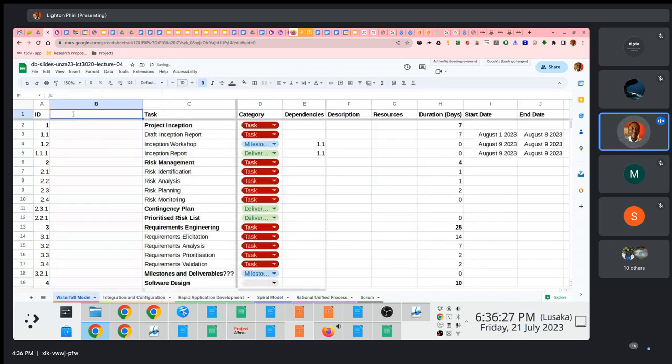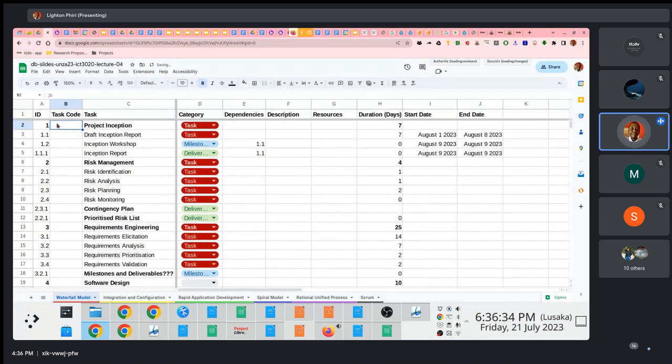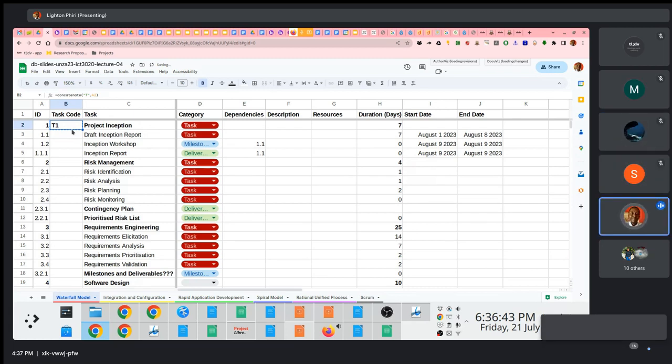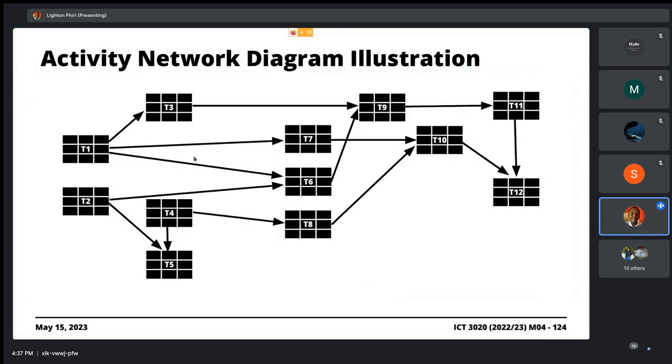Maybe what might be desirable for you is to come up with a column called task code or something, where you concatenate T and this. So this is just going to be a concatenation of the letter T and the code that you're using, right? So you just use the formula here from Mr. Morimu's course. This is probably a good idea. This way, all you do is refer to your breakdown structure, and if I want to model T1, I write T1.1, T1.2, T1.1.1 or something.